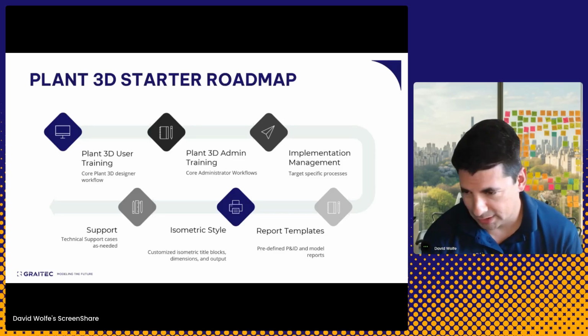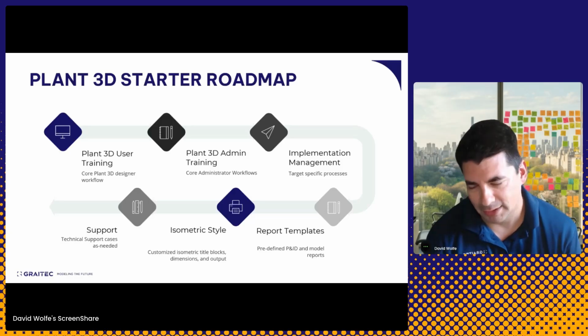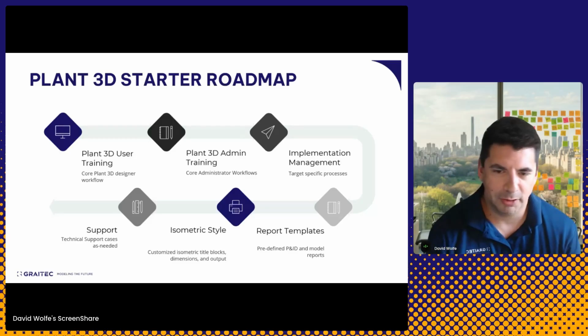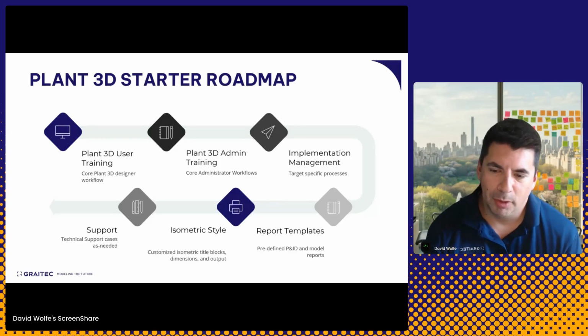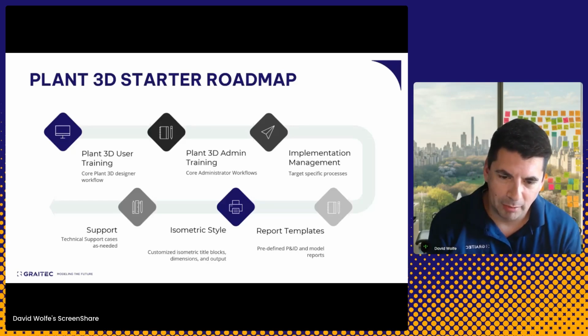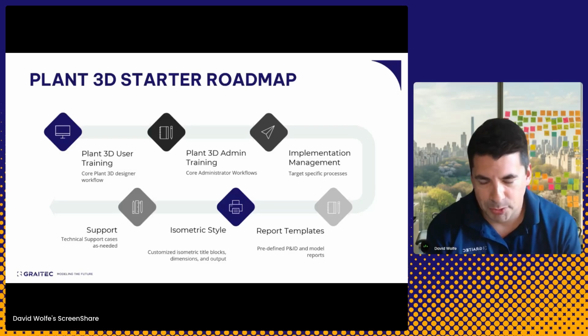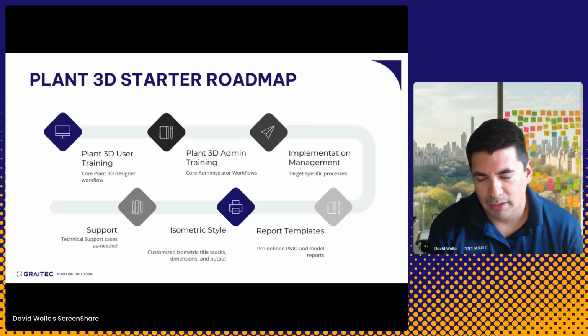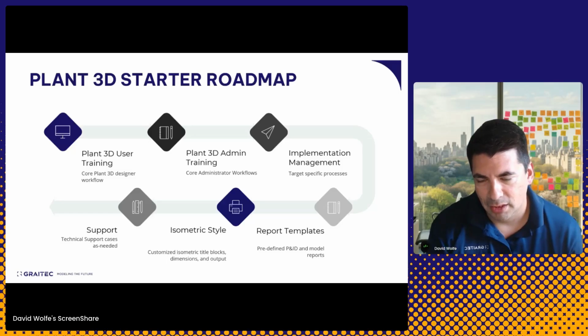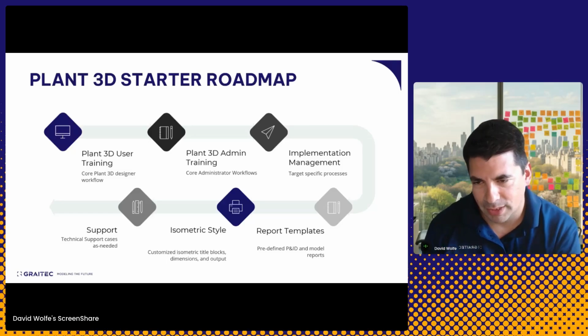And so we've tested this every which way. We've had some companies insist that they want to do admin training first. We've done user training first. We've done mixed. And what we've seen most of the time is that when we skip the user training first, the admins end up having a lot of the same questions. And so we end up covering modules from the user training in the admin training course. And then the other thing is a lot of times the admins need to have the advantage of hearing what kinds of questions the users have.